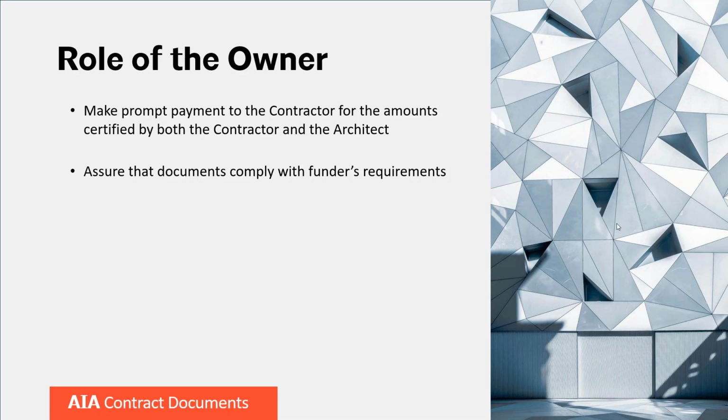agreements refer to the payment process, the owner has provided appropriate legal provisions to reflect any specific requirements for the project. And part of that could involve if there are requirements from a lender or other funding source that require special review each time payment is made. The owner would need to make sure that that process has been thought through and that it can show up in the document so that the process proceeds as intended and that all of the requirements are met once the certification of payment is issued.